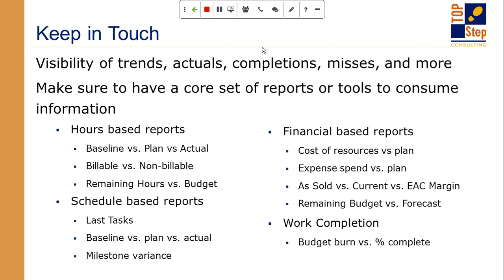And some of those non-billable hours are things that have to be considered the next time you do estimation. And some of those non-billable hours are really just an indication that you're using resources that don't have the full skill set, so you're using it as a training exercise as well, and you certainly don't want to hurt the profitability of the project or at least hurt the budget to the customer with those hours.